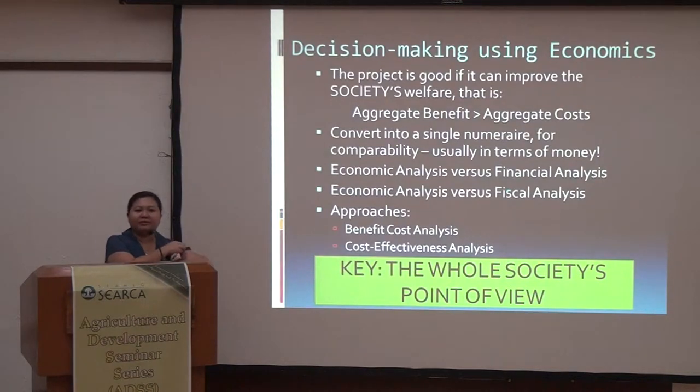And as we know, money is very universal. We know what 1 peso means, we know what $1 means. So it's not difficult to communicate with local government units or even normal individuals in terms of money. I would also like to emphasize that economic analysis is different from financial analysis, wherein financial analysis is just interested in private profitability, while economic analysis is looking at society as a whole.